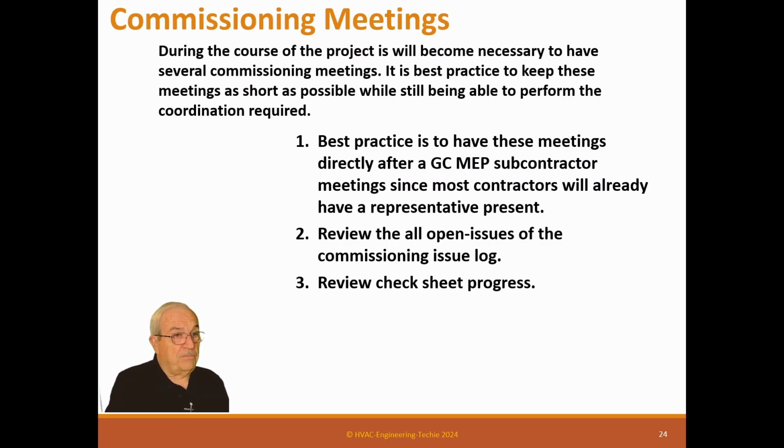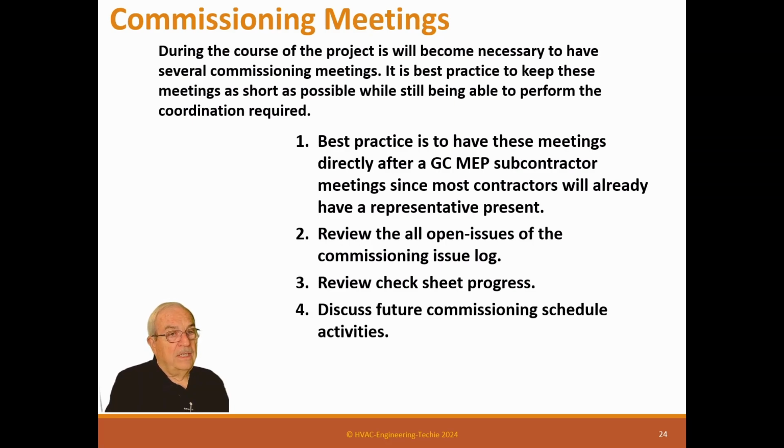Review the check sheet progress. How are you guys doing? Are they done yet? Have you given them to me yet? Discuss future commissioning schedule activities. What do we got coming up? Answer any questions or concerns. And that's it. It's really a short meeting. But it can be important.